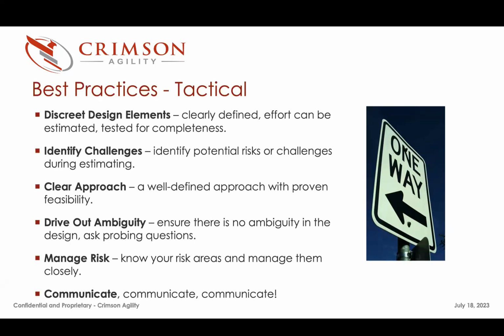Particularly on an upgrade project. When you're estimating the upgrade, say there's some area here of risk and of concern. It's really difficult for us to estimate this without spending a bunch of time estimating it. So we'd much rather come back to you and let you know if it's going to be the best case scenario, the worst case scenario, or the likely scenario. Communicate that in advance. It's not what clients like to hear, but at least you're being upfront and honest with them.